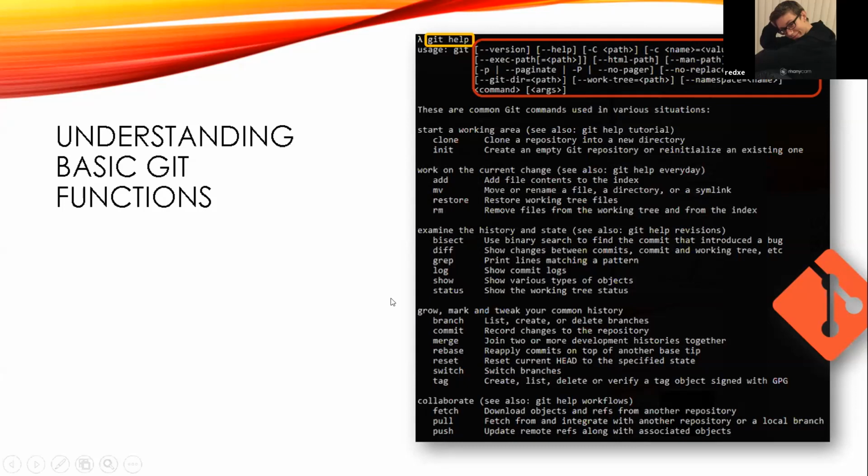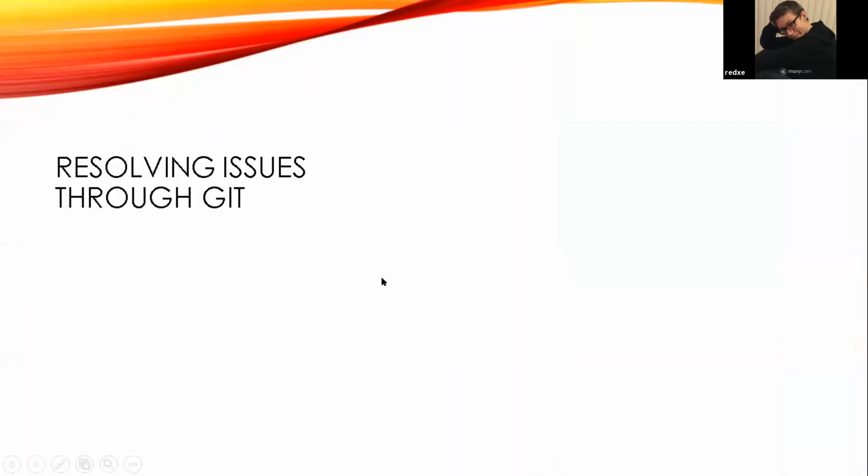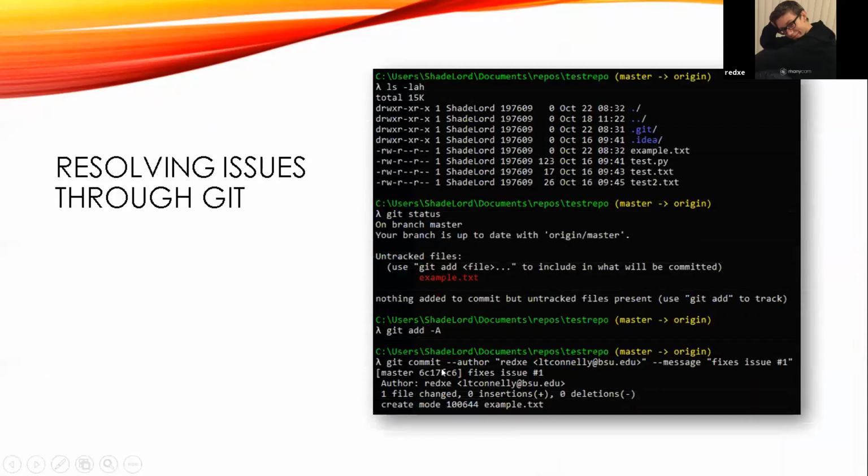So essentially with Git and all the commands that you can use when you're making commits to the repository, you can use this as a means of actually interacting with the Bitbucket issue tracker. It uses a regex and looks for keywords and phrases to identify resolutions or the counter to that in your messages when you commit to a repository, and I'll show that in a second. But yeah, resolving issues with Git, I would say, is pretty straightforward.